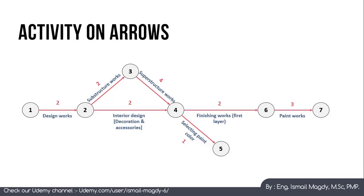After that we have two parallel activities: the first layer of finishing works consuming two months, and the client selecting paint color estimated at one month. Selecting paint color is also not critical — it could be delayed one more month without affecting the schedule. The final activity, paint works, depends on both finishing works and selecting paint color, so a dummy activity is added to show that dependency. The dummy activity is not real; it only represents the logical relationship.